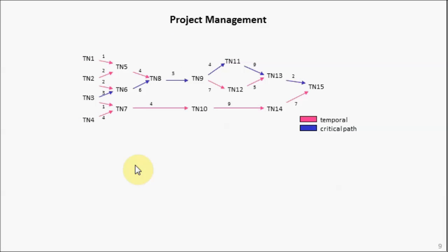One of the classical activities associated with managing a project is the derivation of what is called critical path. It's a collection of tasks such that if any task in this collection misses its end date, the end date for the overall project is pushed out. Now, there are a lot of classical procedural algorithms for deriving critical path. What I'm going to demonstrate here is the ability to derive critical path declaratively using TCSQL's transitive closure.